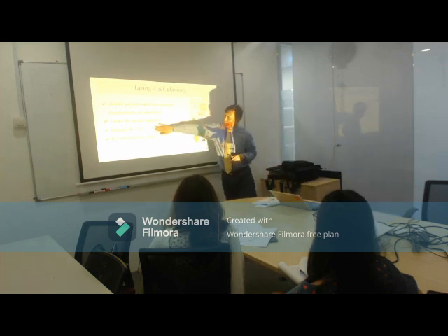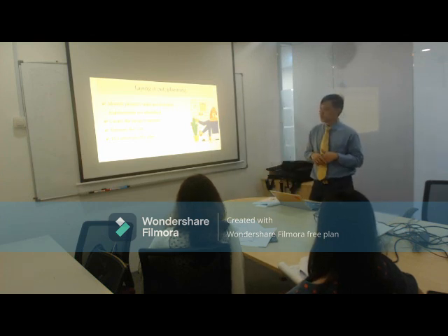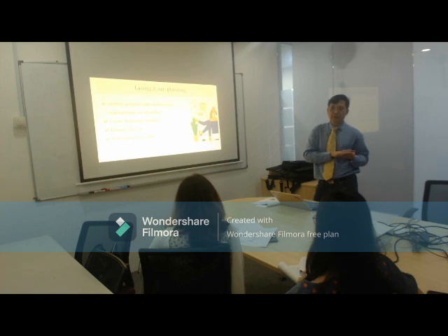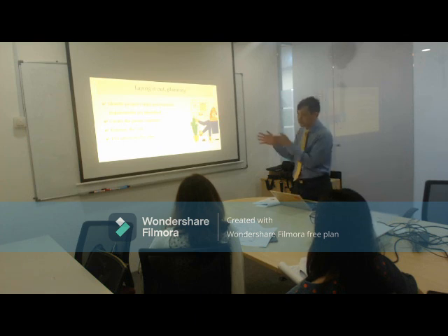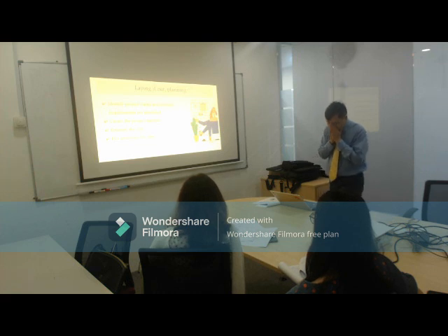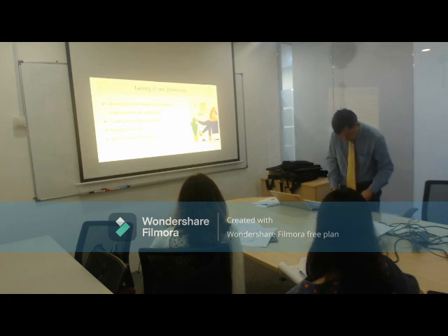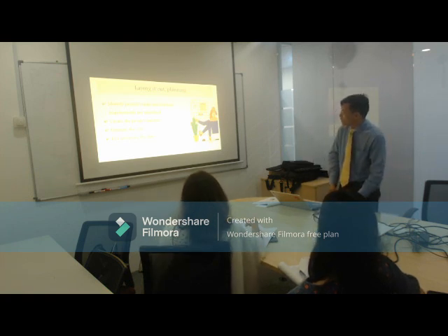So at the end of the day, he also needs to make the estimate of the cost. Once he has the estimate of the cost, he must make sure that he has the budget for it, so that he can do all those things. Or maybe today he doesn't have the budget, he may have to go and extend it. Maybe this month I don't have enough money, I have to wait for next month for the next set of purchases. So that's part of budgeting. Okay, so this is planning. Any questions about this part here? We're done with planning.